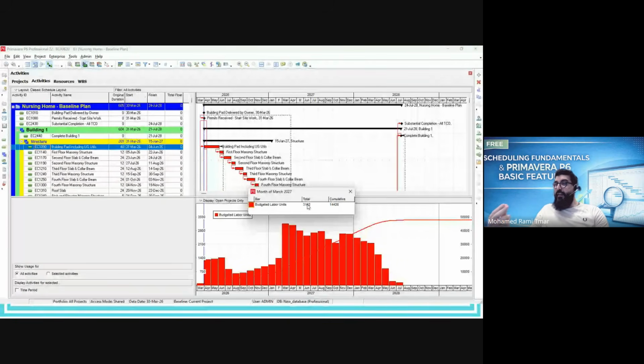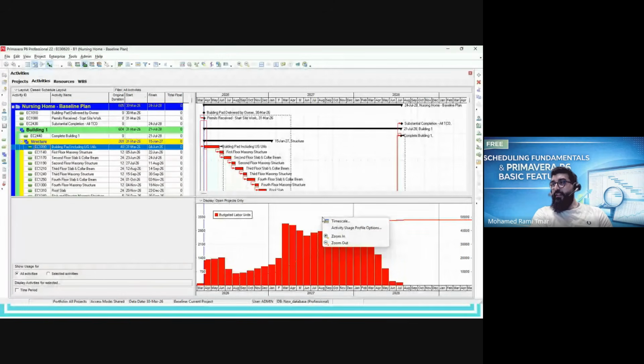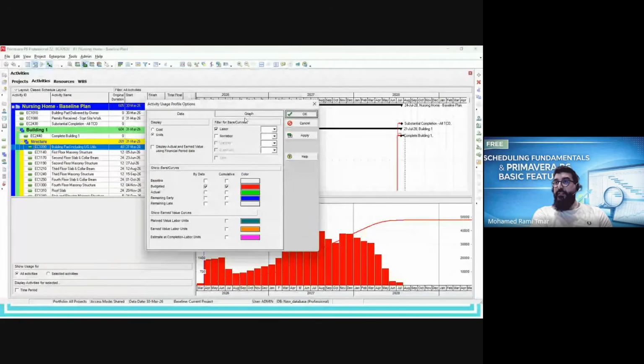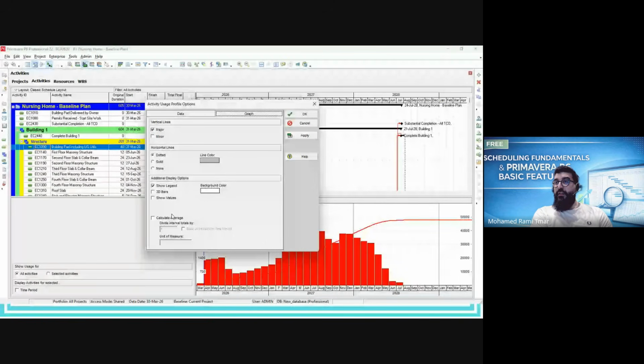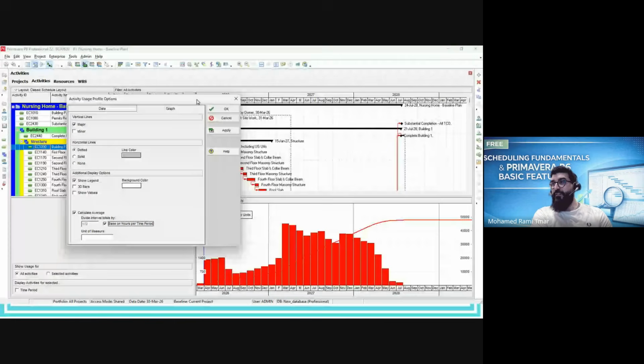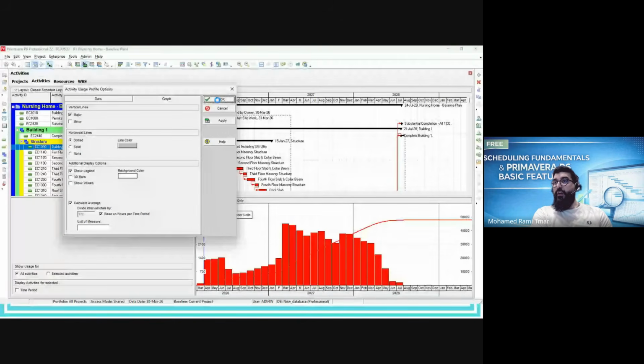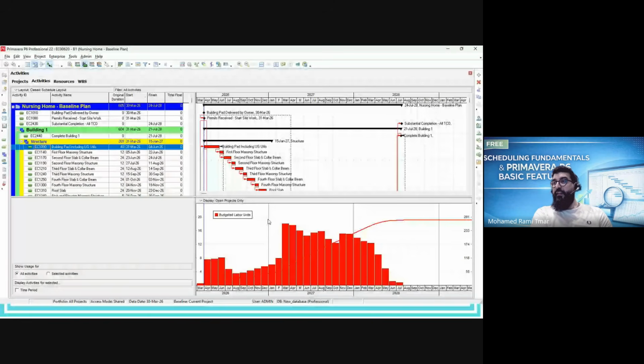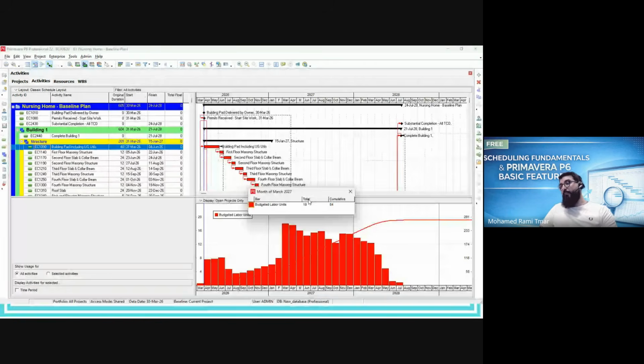And this is also one of the features in the software. You can clearly and easily split this total hours over the base hours, how many hours per month, for example, if it's monthly, and once it is activated, this total is equivalent to 18 manpowers or 18 full-time equivalent.